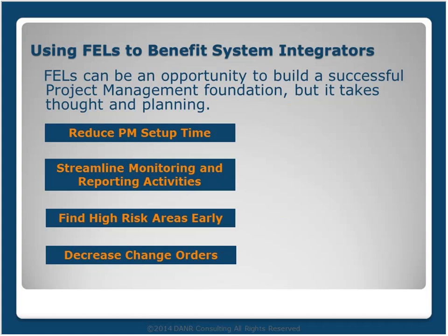FELs can also help to identify and reduce the impact of high-risk areas to you. This is particularly important on firm price and fixed bid jobs. So identifying those high-risk areas is valuable to your client from an overall project cost standpoint, but it's also valuable to you as an integrator to know where your risks are and work to eliminate their impact to you from a financial standpoint, a schedule impact, and so forth.